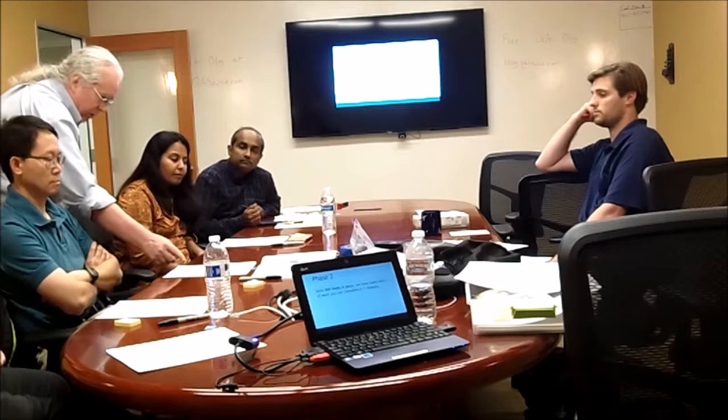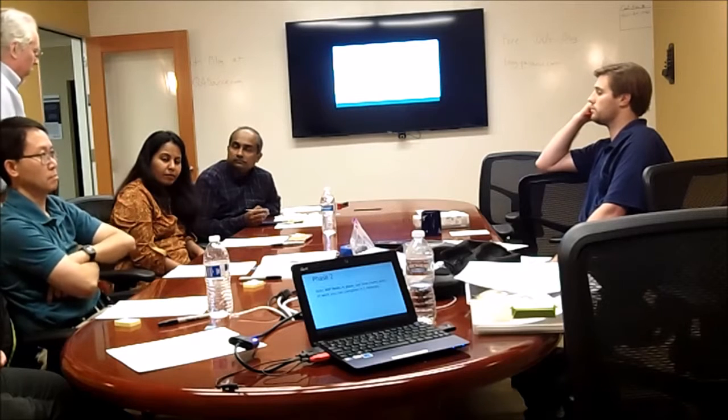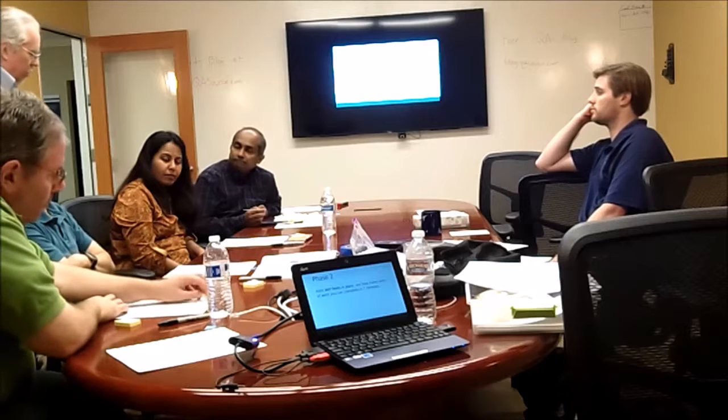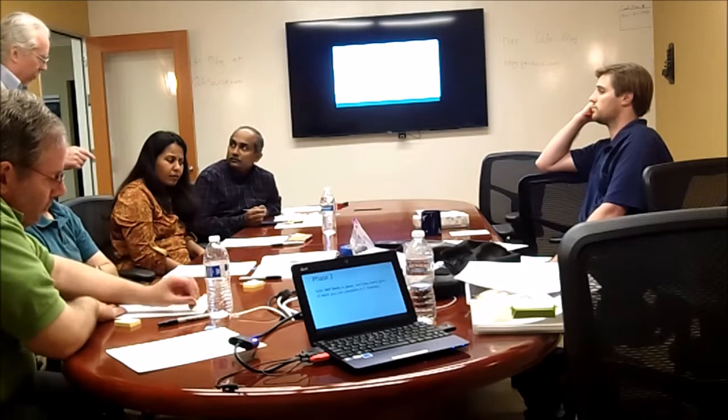The rule is you cannot move something into this slot if there's anything in it. You have to wait till it's empty. And same for, he can only have one unit of work in there, and you've got to follow that. Your job, Jay, is still to make sure that this operation does not starve